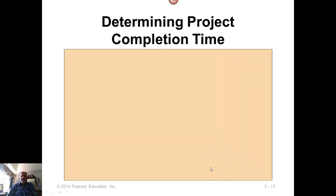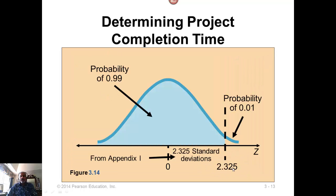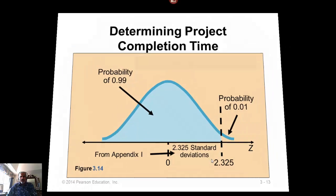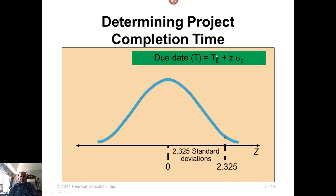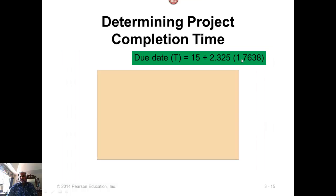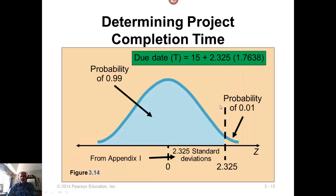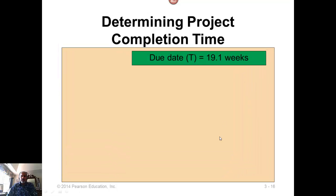You can turn this around and then say, probability is given and we want the due date for that probability. This is the probability of completion. Go to the normal distribution table and find Z. That Z is 2.325. Then, the due date is given by this formula: T sub E plus Z times sigma sub P. T sub E is 15, Z we just looked it up, 2.325, and then substitute sigma there, and you get your due date, which is 19.1 weeks.